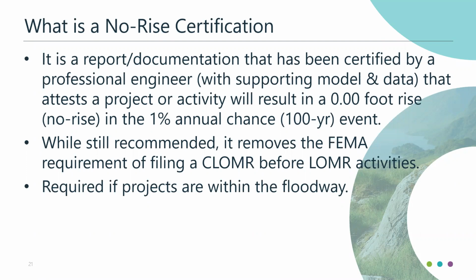So you file a CLOMR, you have to pay for the CLOMR, and then when you have it constructed, you'll have to do the LOMR after the fact, which is another fee. And it's basically required if any projects are within a floodway. So just keep that in mind. And of course, if there are local requirements that are more stringent than FEMA's, then keep that in mind as well. I know of areas, for instance, in Canada, where you have to do a no-rise for just the flood fringe, not even in the floodway, as an example. So just keep that in mind.